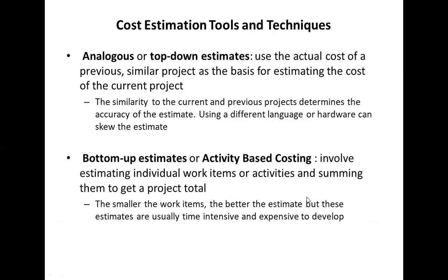They are used early in the project. The last one is not used early in the project. It's normally used in purchasing items. However, the other two, ROM and the budgetary estimate, are done quite early in projects.